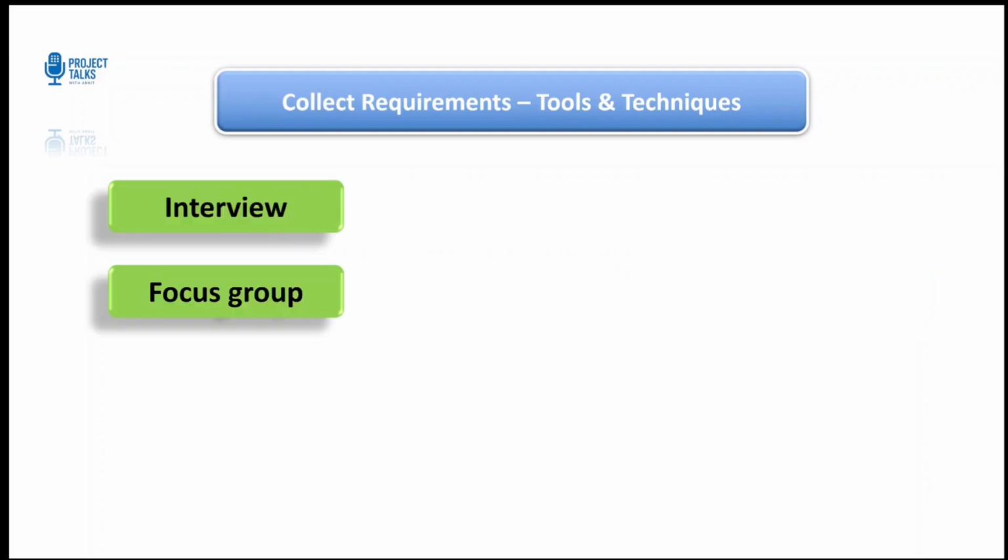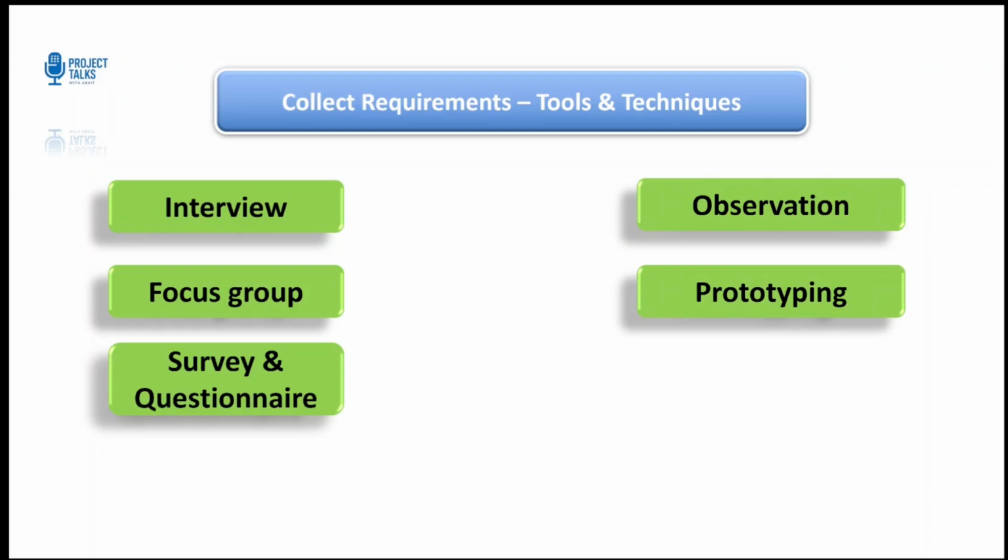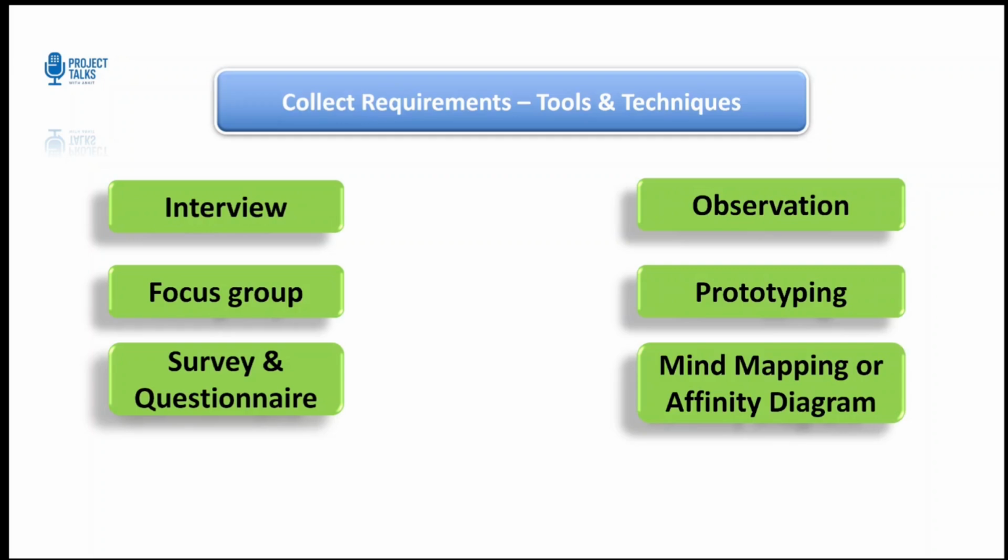Now, the PMBOK suggests several tools and techniques here, including interviews, which are one-on-one discussions, focus groups and workshops to gather diverse perspectives, surveys and questionnaires for large stakeholder groups, observation for shadowing end users, prototyping to visualize the solution early, mind mapping and affinity diagrams to group related ideas.